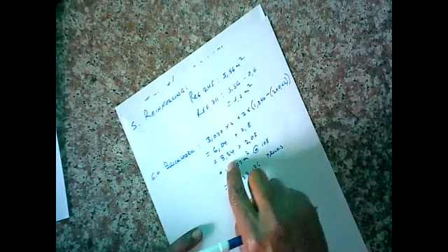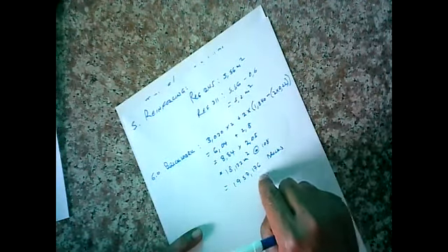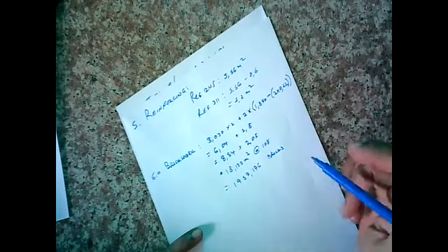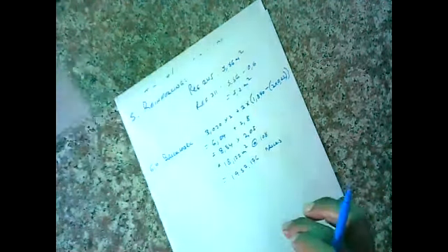Remember, this is a calculation for one. If you round this off to the next, you're actually increasing the quantities of bricks unnecessarily. After brickwork, what do we know? If we know the area, we can also calculate mortar. But remember, there's also further.